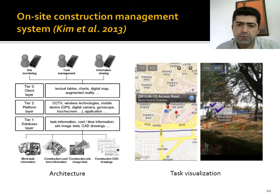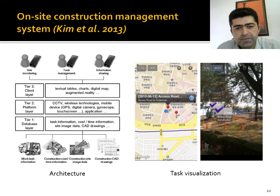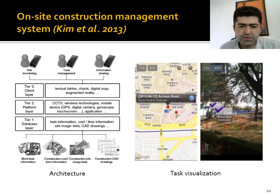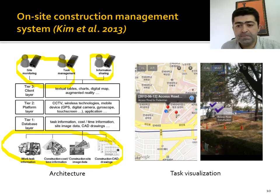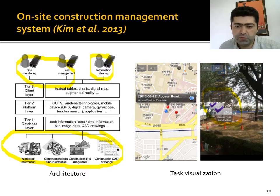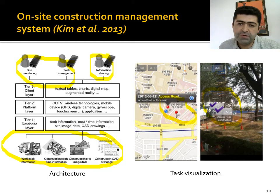The first example belongs to progress monitoring and task management in the construction project management domain. Kim and others developed a system proposing an onsite construction management system where construction information is shared and used in task management and site monitoring activities. Tasks are visualized on a digital map and pinned using augmented reality. Managers can assign roles to workers and check their statuses using the system.